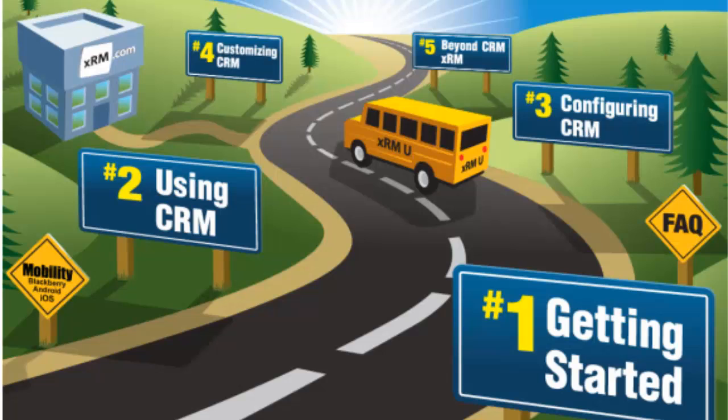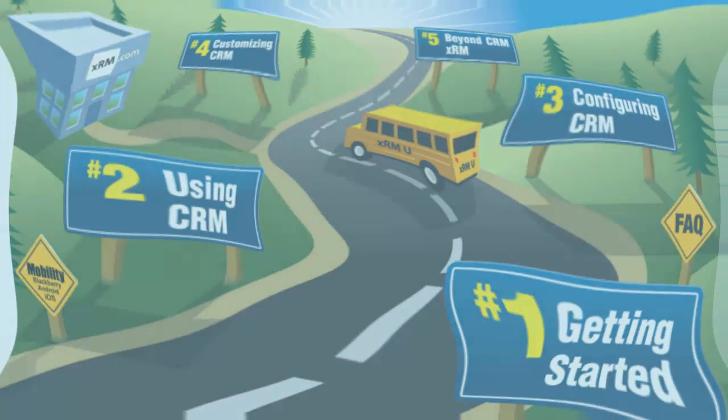Work with Lewis to set a deadline for the software team and write the training based upon the software at that point. Any further fixes would be deployed later as an update. Motivate beta testers to complete online modules by offering comp time or overtime.